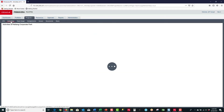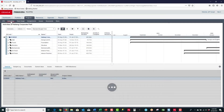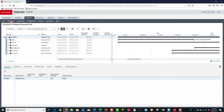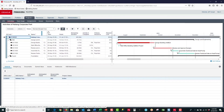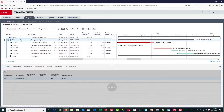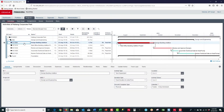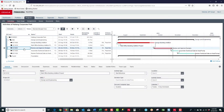The Activities page is the primary view used to manage the project's work breakdown structure elements — i.e., deliverables, related activities, milestones, and resource assignments. If I left-click on the gear and select Expand, I can see the Activity table which consists of work breakdown structure elements or deliverables, and then Activities, which are the efforts required to produce those deliverables.